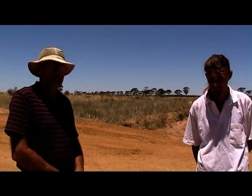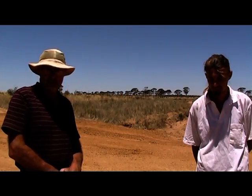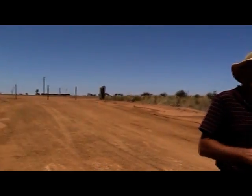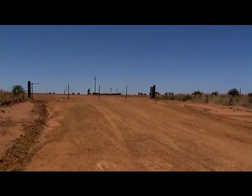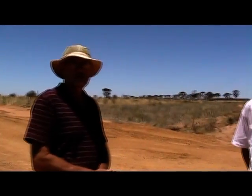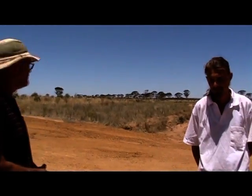There's about 75 cubic metres of gravel that's gone in here, and in the centre section it's been stabilised in 2 layers with 1.5 tonnes of cement, blended in with the gravel just to give it a seal. And just a little bit of water, and then it's been rolled with a Dynapac roller. David did.